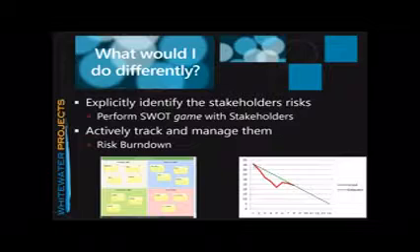We don't have time to get into that here, but you're able to then say, okay, we've gotten through this design and architecture, we've prototyped it, we now have the fuselage design done. I can now mark down those risks as either passed completely, or I can reduce their probability and impact because the situation has changed. So this is active integrated risk management.